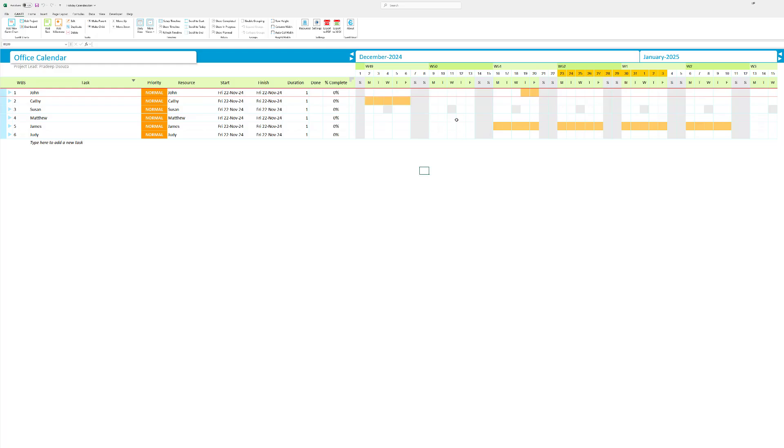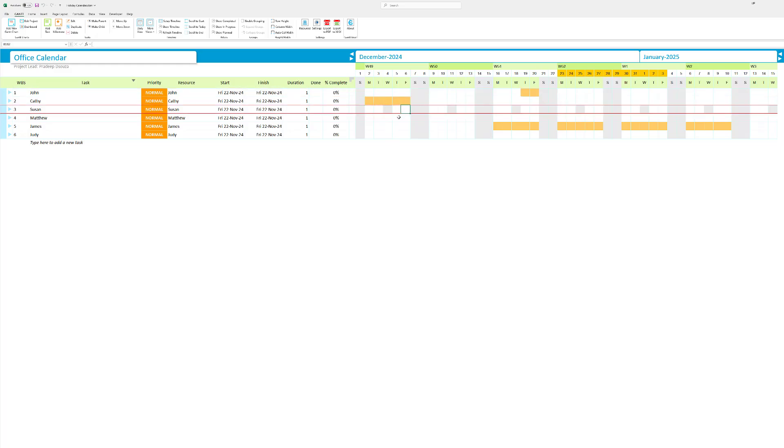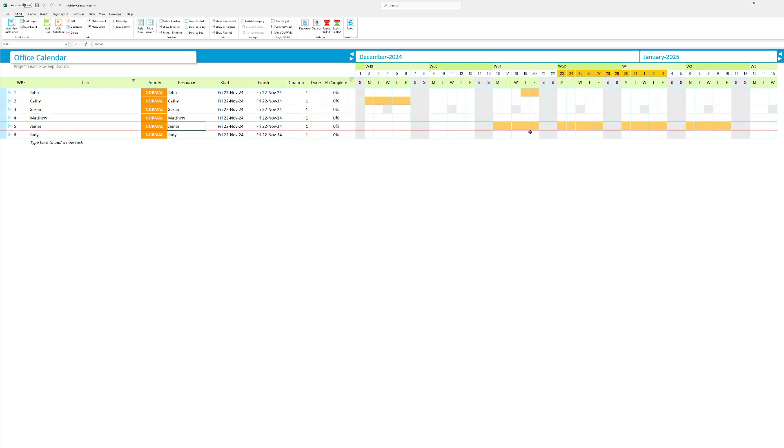And Susan works only Monday, Tuesday, Thursday and Friday, and doesn't work on Wednesday. Matthew, on the other hand, is working throughout the month here. James is on holiday. James is off on vacation from the 16th all the way to January 10th. And Judy pretty much is not on holiday in December and January as well. So that's pretty much it.